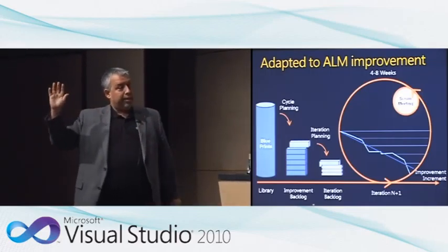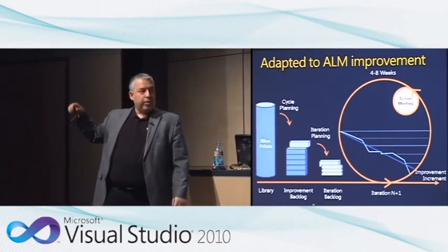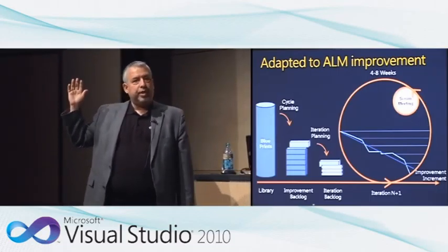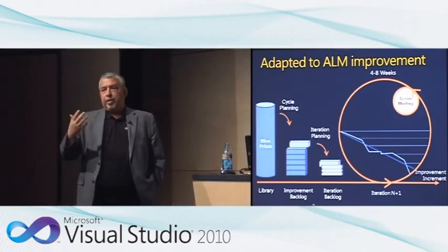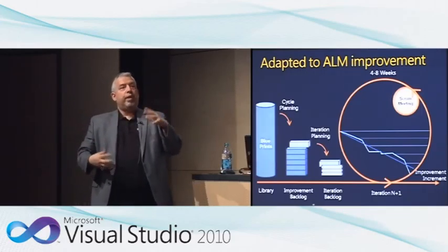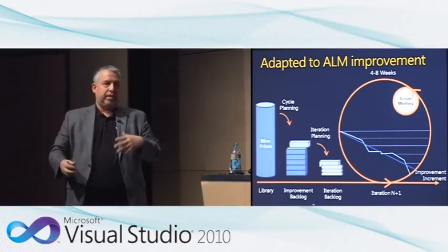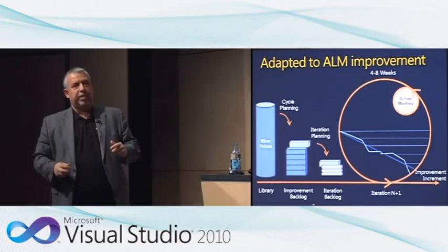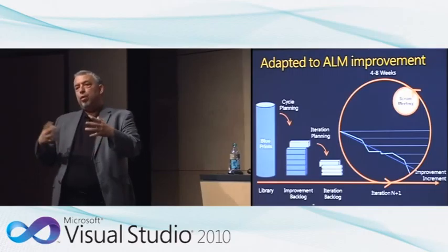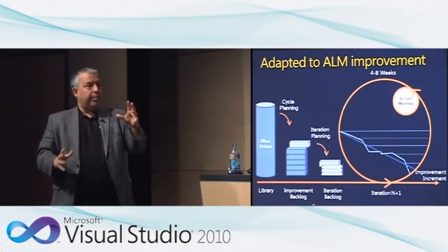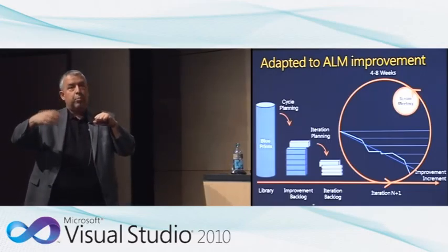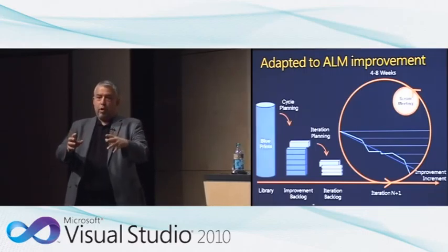We've also added, at the first part where we normally would do our release plan, instead, we call it a cycle plan. We added the blueprints. The blueprint basically is a series of templates or standardized improvement items. Again, we've implemented TFS and process change in 400, 500, 600, 700 teams over the last 7, 8 years. And there are some of them that are very standard. So what we did is we tried to capture a few of the basic ones. We have, I think, 19, 20 in the blueprint to help prime the pump, to help think of this is kind of where we could start.